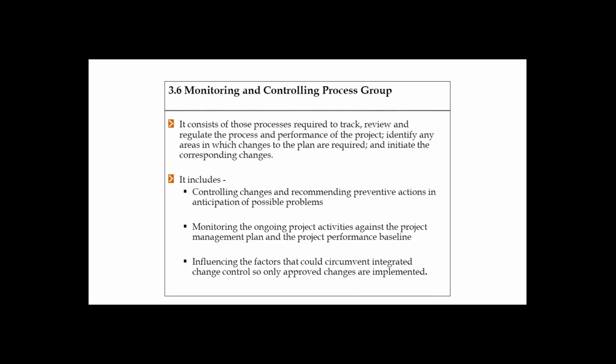There will be an internal change control board and an external change control board, because if it is a common environment which hundreds of projects use, then there will be an internal change control board, and then an overall organization change control board. They will review our proposal, and once they approve the change, only then do we go ahead with the proposed changes.